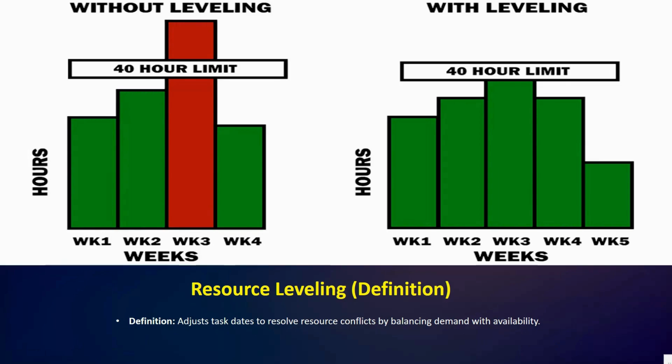In simple terms, if a person or a piece of equipment is double-booked and assigned to two tasks at the same time, leveling delays one of those tasks so that the resource can complete work on one task before moving to the next.